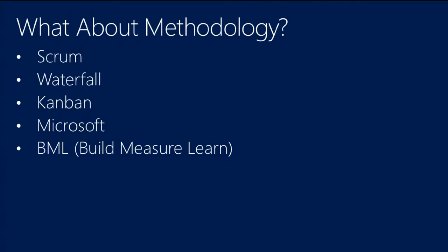What we do is we have a period of time where we want teams, if they've accumulated some debt, to drive their bugs down to where, within the last 36 hours, no new bugs have come in that you haven't fixed. It's a way to get really, really clean. So we're managing bugs all the time, but then we have these other things that we do along the way. And I don't know what methodology that fits into.